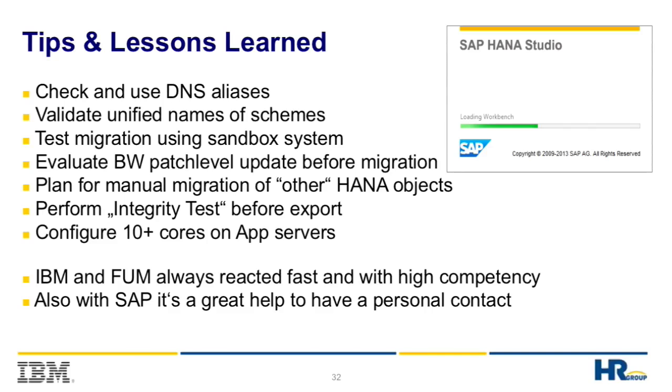For the migration, you always have to think about that, because you have to do it in a time frame which is normally a weekend. When you do an export from a SAP database, the work is not done on the database level, it's done on the application level. So take care that you have enough resources available for the application staff who does the export, because that is influencing the downtime.